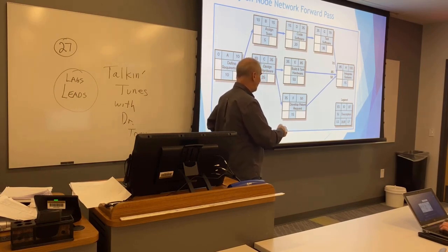Now, here's a good question. Do you think this is going to have any slack time? If this is 86, what's going to happen to this number here? What is it going to be? 101. Right now it's going to take 100 days for the project. We can't have this go to 86. But if this takes 71, do we have a problem? No. If this takes 51, do we have a problem? No.